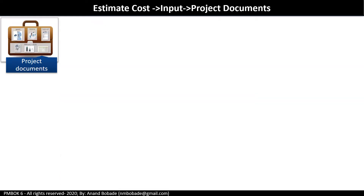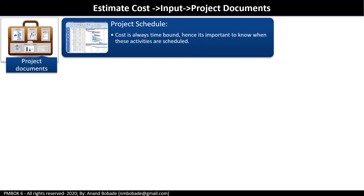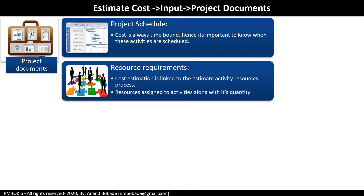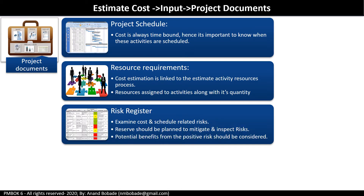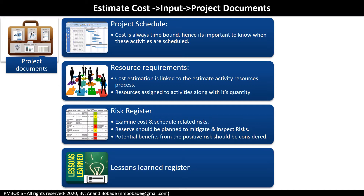The project schedule provides duration estimates for each work package or activity, combined with resource information, to create the cost estimate. Cost is always time-bound, so it is important to know when activities are scheduled. Resource requirements identify the type and quantities of resources required for each work package or activity. The risk register contains information used to estimate cost, especially when obtaining three-point estimates including optimistic, pessimistic, and most likely values. The lessons learned register contains information about past cost estimation exercises and lessons learned, helping to improve accuracy and precision of cost estimates.